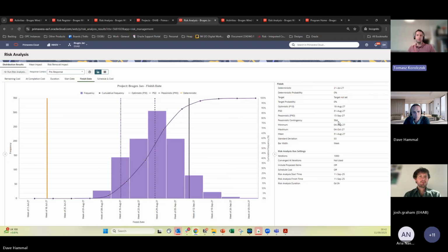Yeah, and I think that's super important, because you create your baseline and that's your starting point. If you then model your weather risks in a deterministic way into those activities, and then you start having some delays, none of that is going to apply anymore.